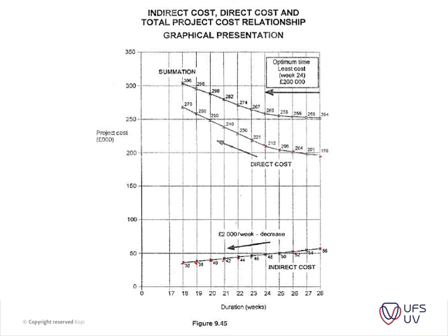Going up, just adding this one to that one, we can see that we've got a slight jump here, and then here's that 7,000 jump that we highlighted in the previous table, which means that our optimum line of time least cost is at week 24.